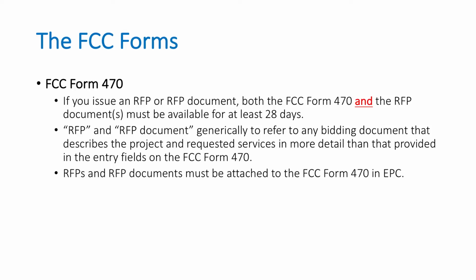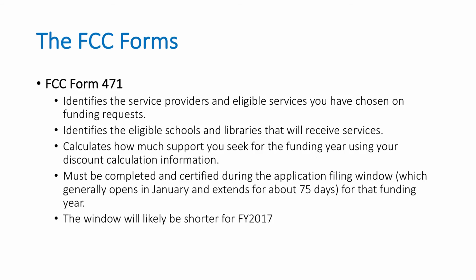And this talks a little bit more about that. So if you issue an RFP and a 470, those both have to be posted for a minimum of 28 days. The benefit also on the provider side is that is where the detail of the service you're requesting can be listed, identified, mapped out, described, etc. On the 470, there's a very, very small narrative box that doesn't give you a lot of space to put in what it is you're looking for. You're looking for internet service. These are the speeds. This is the amount of bids we want, increments of 100 meg, for example. All those details can be put in an RFP rather than the 470 narrative box because it's very small. So that is another benefit there.